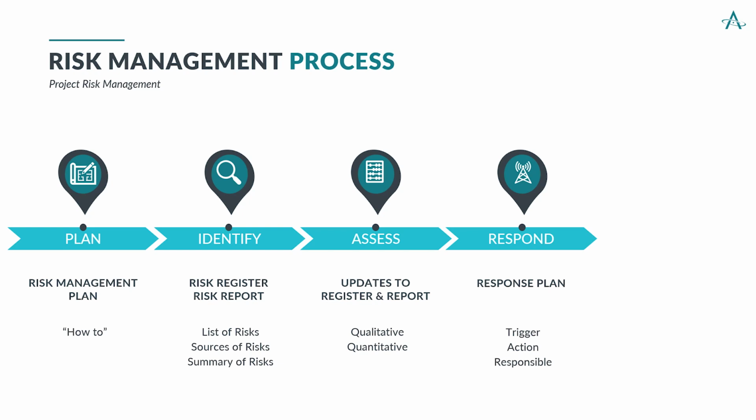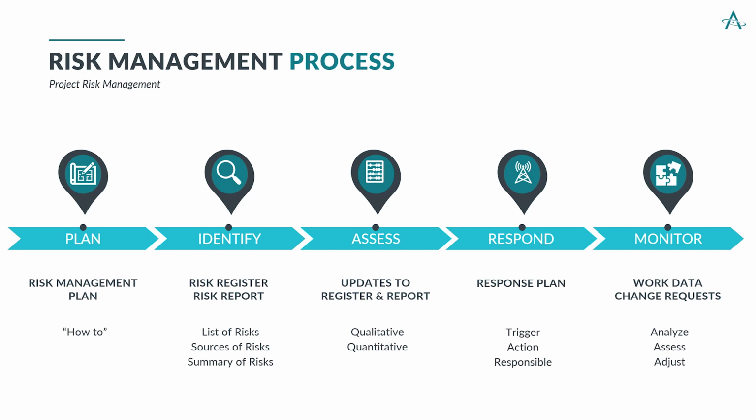Next, we want to talk about what action, specific measurable action that we can implement so that when the risk turns into an issue, we have a plan already. And then, of course, when you have that action, who's responsible to get that action done? So further developing a plan that says when an event happens, we can identify it, we know it, and here's how we're going to respond. Responsible risk management.